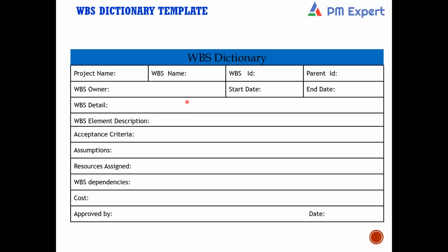In the request for proposal, for example, this SOW will also be given. The supplier will respond to this request for proposal by sending a proposal. This proposal will contain their approach, their understanding and the pricing for the project. Often a customer sends the RFP to multiple suppliers, so companies like Infosys, Tech Mahindra and TCS compete for the same project. One of them wins the bid. These companies submit proposals, the proposals are evaluated by the customer, and whoever the customer considers best will be awarded the contract.